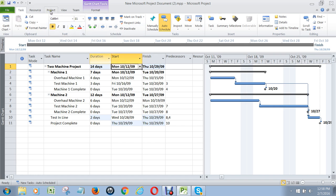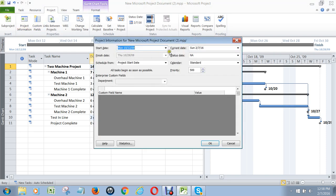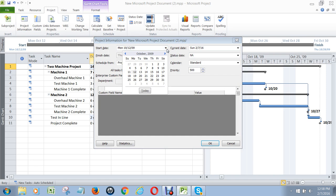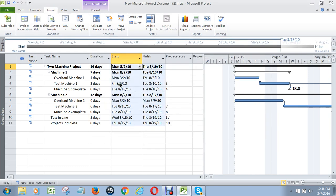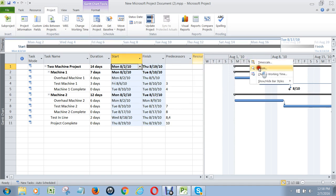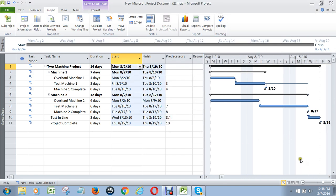Then make the start date whatever date I want it to be. Let's pretend we're back in time and it's August 2nd that we want to start the project on. Click OK. See what it did? It changed all the dates to that start date. And I'm going to zoom to the entire project so it will center itself and I can see the entire project — when each milestone is achieved and when each task starts and finishes.